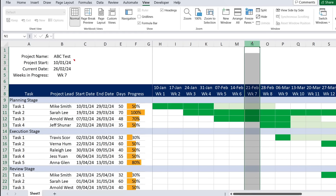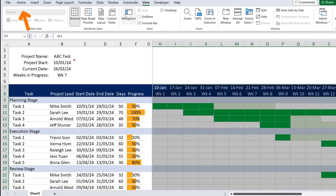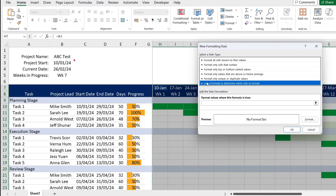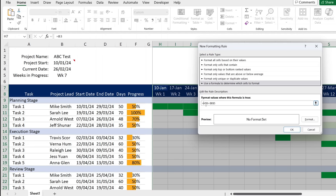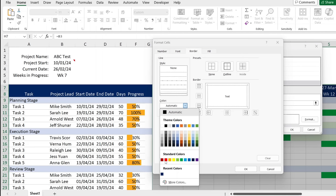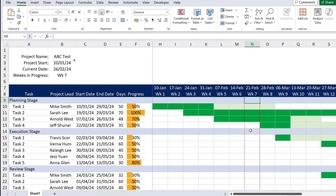The second task is highlighting the current week. Select the entire date header area from top to bottom, go to Conditional Formatting, New Rule with a formula. The formula checks if the week header equals the 'weeks in progress' value calculated earlier. Remove the column dollar sign so it moves across columns. Set the format to a bright red border on both sides, and click OK.